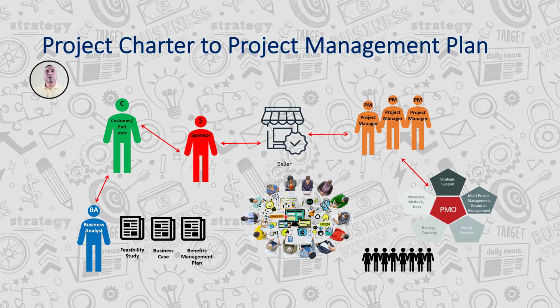If not, what changes can we make, or should we stop the project, terminate the project now, or kill the project? So this is also called a kill point, or a toll gate. And as the number of phases are delivered, that's what we call the project life cycle. The number of phases which need to be completed to deliver the project is called the project life cycle. It can contain X amount of phases because every project is unique and will have a different number of phases.